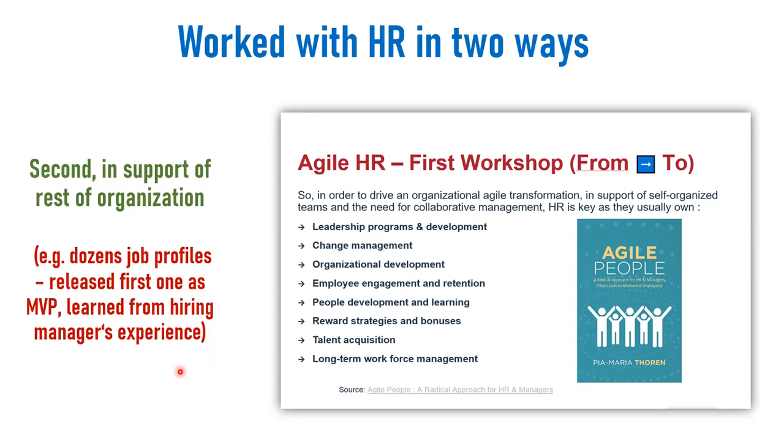It was between 30 and 40 job profiles. Do them a bit at a time. The very first one would be an MVP, and the rest would be minimum business increments, as Disciplined Agile calls it, or minimum marketable features. But get away from the big bang approach.